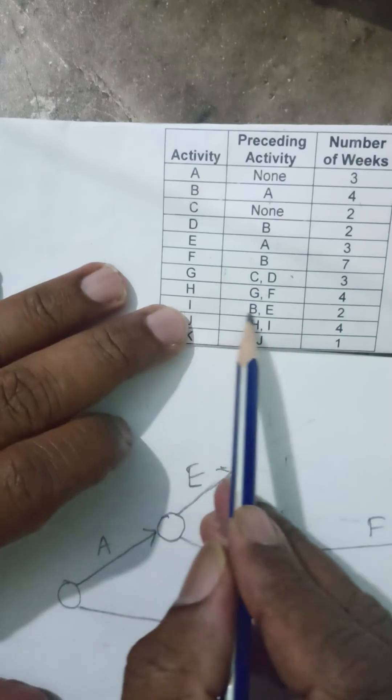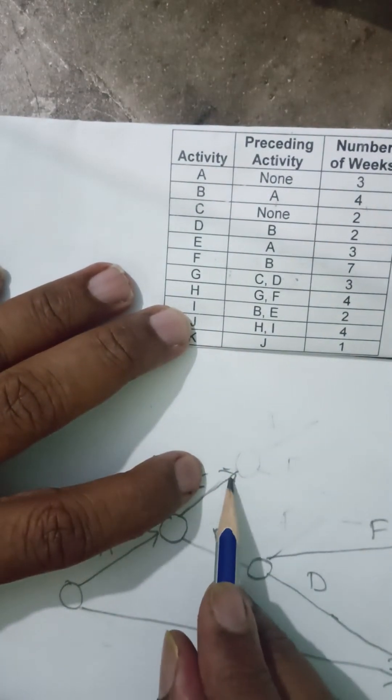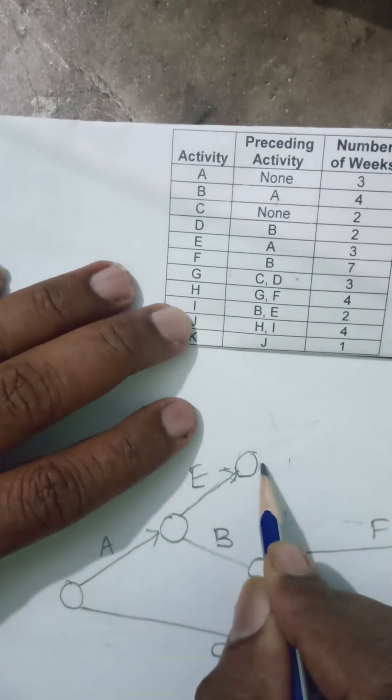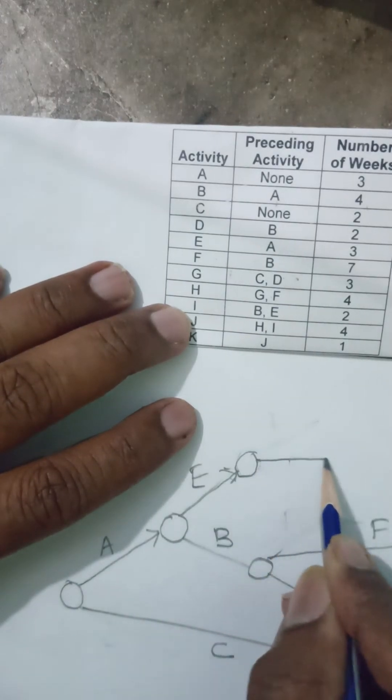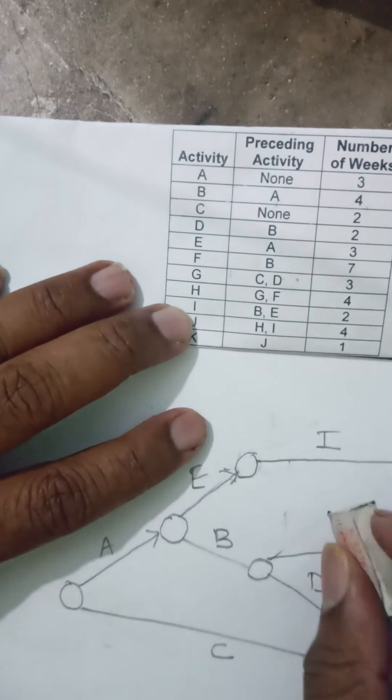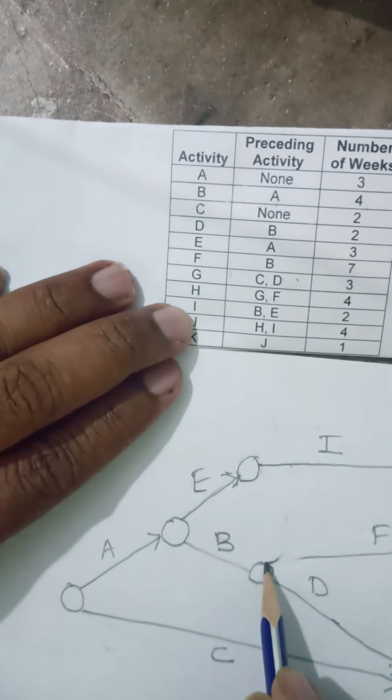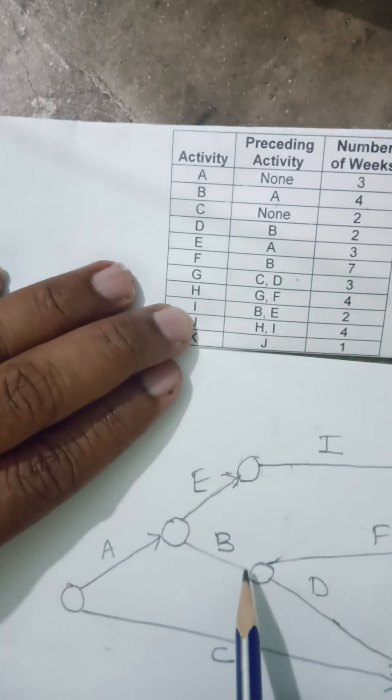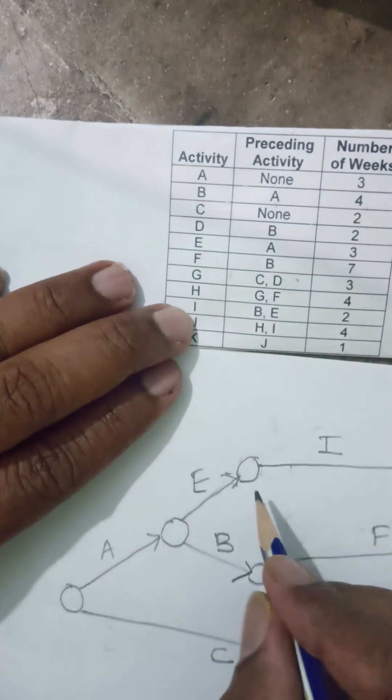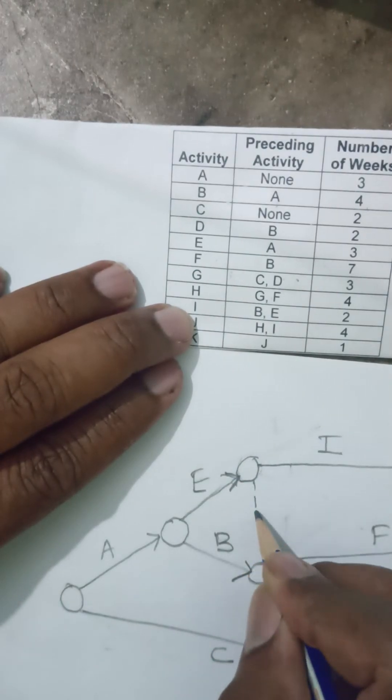I is from B and E. My B is here, E is here. From here suppose I want to start my I. But then the logic says that I cannot start I unless B is also finished.